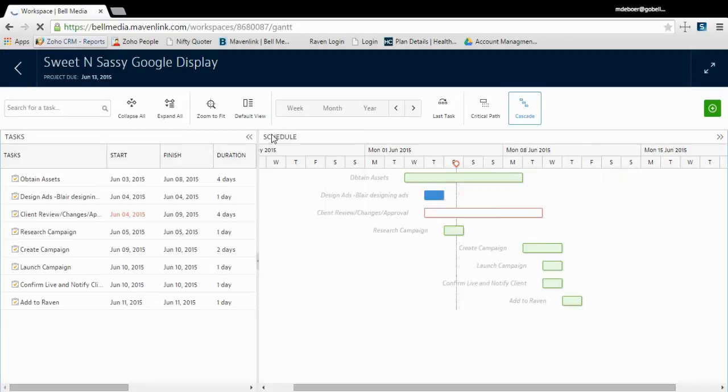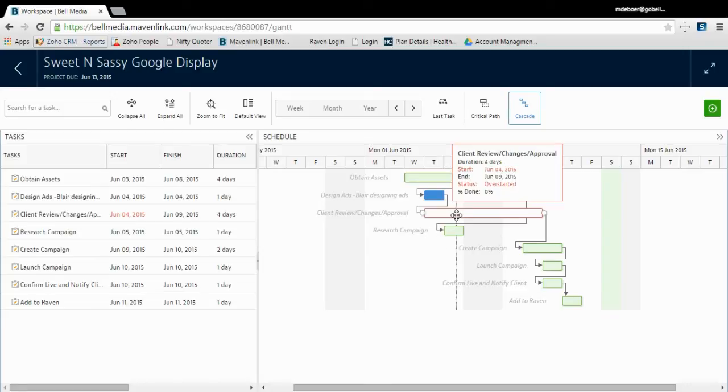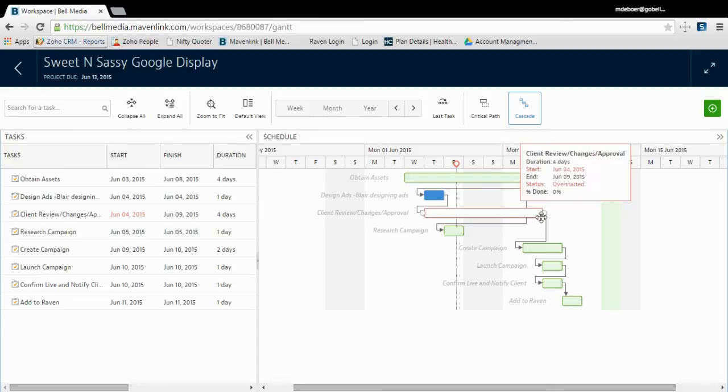That leads me into this. The Gantt chart is utilized to set those predecessors, so that our users are not trying to start tasks too early or too late. It helps identify specific needs for a specific task, and use those needs to be completed prior to starting a new task. Again, this view is used mainly by our admin team members, and therefore not something that you need to worry about too much.